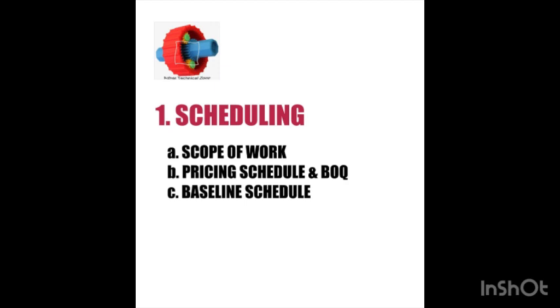BOQ means bill of quantities of the project. To get the pricing schedule and BOQ, you can approach your concerned manager or your reporting manager, or else you can approach the estimation department to fetch that data before preparation of the schedule.